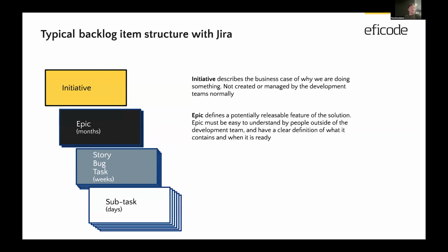Sorry, just to interrupt, to highlight that an epic is really something that has a start and an end, and it provides some features, some functionality. We've sometimes seen continuous epics, where the epic is a kind of component of the product and we just attach everything related to it. But the idea of an epic is that it has a clear start and end.